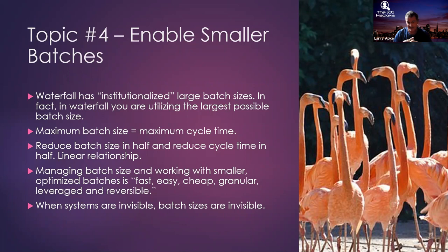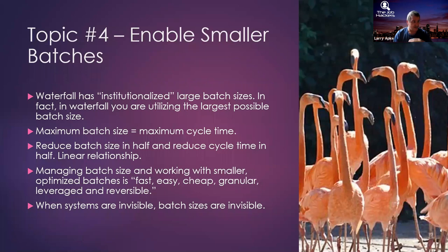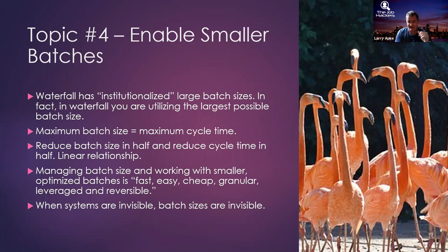If you have a maximum batch size, you're going to have the maximum cycle time. Cycle time is: once we start on work, how long does it take before we get to the end point, which is making money? There is no value in the work itself. If you have the largest batch size, you'll have the maximum possible cycle time. As a rule of thumb, if I cut the batch size in half, I will roughly cut the cycle time in half.